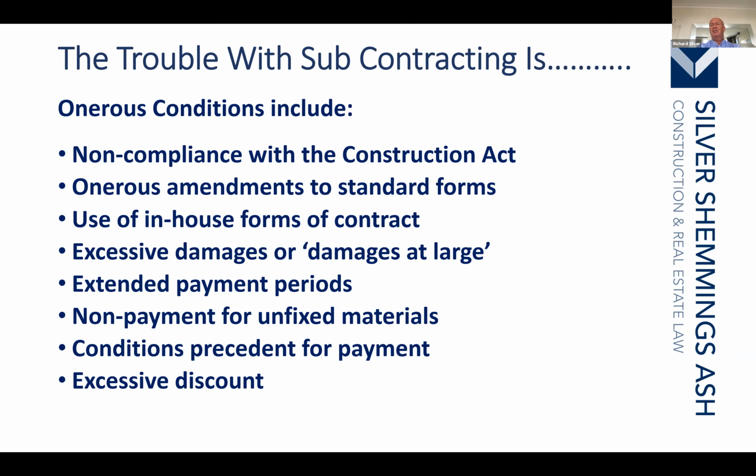One exception to this is where the contract is in relation to works on someone's residential premises. But equally, where it is a construction contract, it must include certain payment provisions detailing what is to be paid and when, due dates and final dates of payment and payless notice, etc., etc. If it fails to comply, provisions from the Scheme for Construction Contracts are implied.